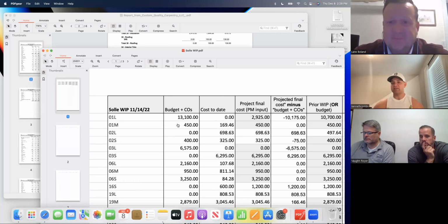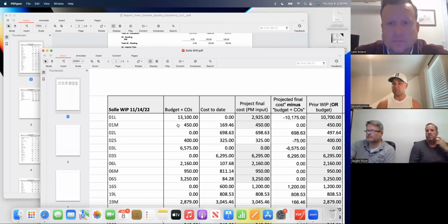So what happens is I'm the project manager on the job. I have access to CoConstruct on my phone or my iPad or whatever you give the guys. I know I've got plumbing coming in next week, and I've done this WIP last month, and when I was in framing I knew I was already trending over. So I'm looking for opportunities to save money.